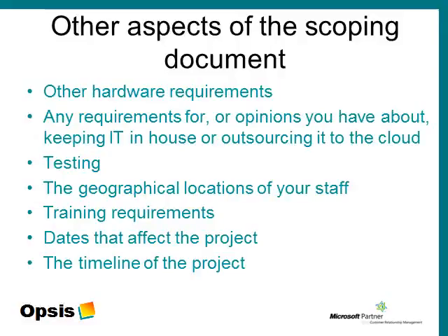There are many dates that will affect your project, and if these dates are not taken into consideration, you run the risk of the project falling behind or even failing completely. These include financial year and or quarter year dates, if the year end or quarter end creates additional workload for team members or users. Leave booked by any members of your team, particularly longer blocks of leave that people have booked. You also need to think about leave booked by team members of your CRM team, because this may put additional work on your CRM team members so they are unable to complete the CRM project work in as much time.